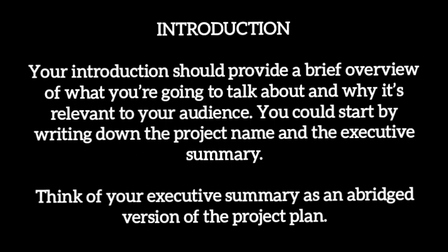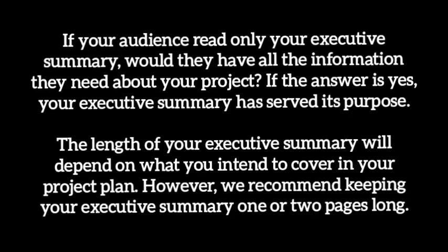Think of your executive summary as an abridged version of the project plan. If your audience read only your executive summary, would they have all the information they need about your project? If the answer is yes, your executive summary has served its purpose. The length of your executive summary will depend on what you intend to cover in your project plan. However, we recommend keeping your executive summary 1 or 2 pages long.